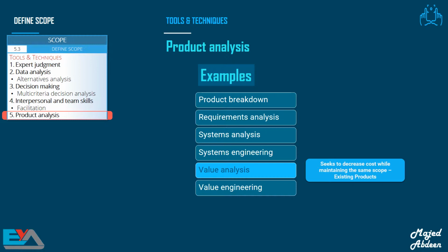When performing value analysis, you systematically identify the required project functions, assign value to these functions, and provide functions at the lowest cost without any loss of performance. Remember, just because you are doing a lot more doesn't mean you are getting a lot more done.